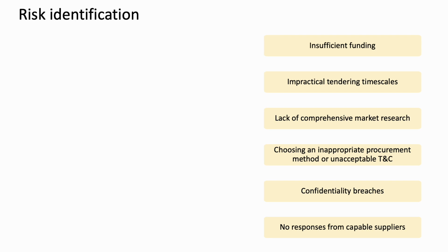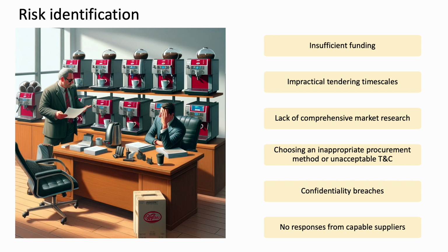In the scenario where a cafe decides to upgrade by purchasing a new coffee machine, opting for a tender process with a pre-qualification questionnaire could pose challenges. Many large coffee machine manufacturers might find the cafe's business too small to consider, leading them to opt out of participating.